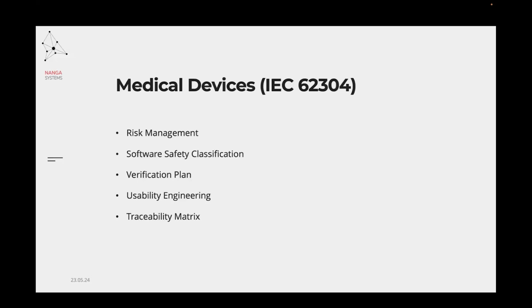And last but not least, traceability matrix or traceability in general. It's a best practice to create and maintain a traceability matrix linking the different requirements to risk controls, software requirements to risk controls, design, implementation, and testing.